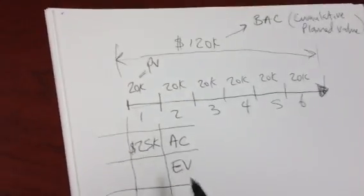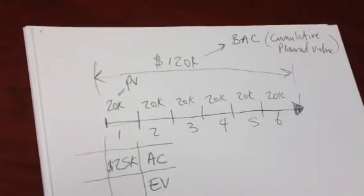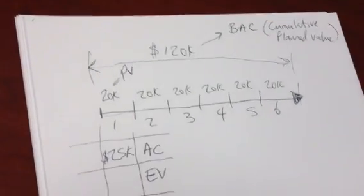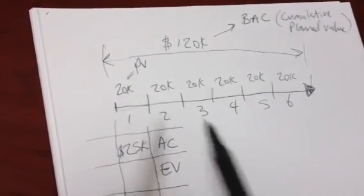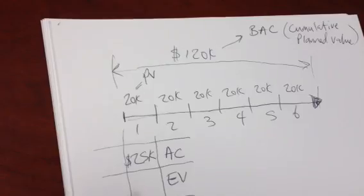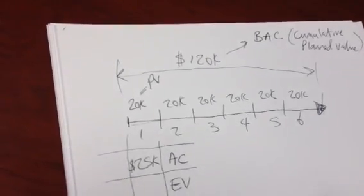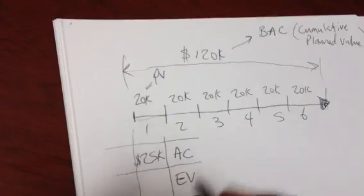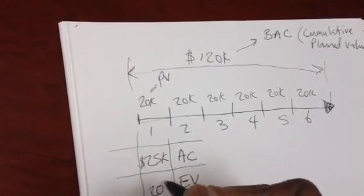Now, the last metric is called earned value. Earned value refers to the budgeted cost of work performed. So, if you got all of the work done in a particular month, let's say you got 100% of the work done, that means your earned value for this month is going to be $20,000.